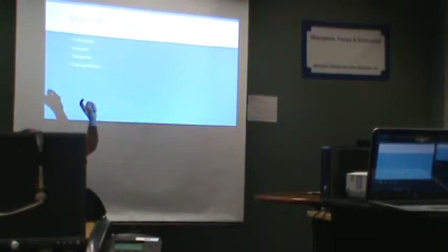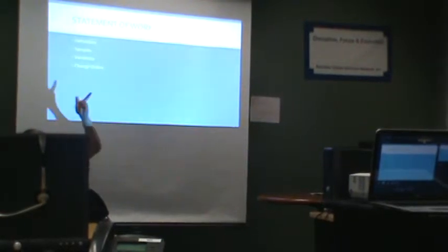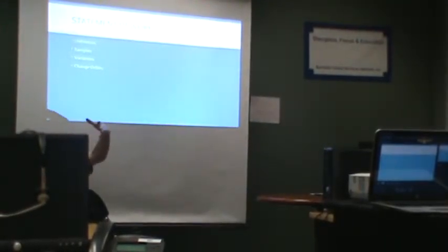In most of our CBW ones, all of the price and all of the SOWs are based on an hourly rate. So we would just apply that hourly rate to it, okay? Hey, we're gonna go do, instead of 8,900 devices, it's 1,000 devices, okay? Here's your new rate. Instead of, we need 3 extra hours to complete this work. Okay, it was built on $75 an hour, so that's $225.